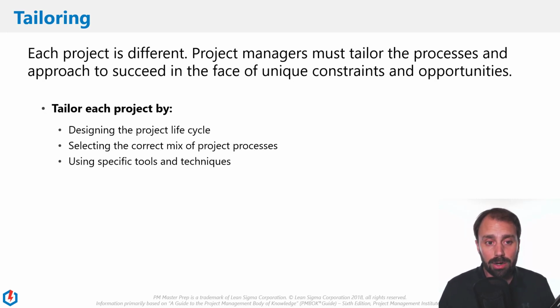So you're going to tailor each project to design the project lifecycle to fit what's needed by the client. And then you're going to select the correct mix of project processes based on logic. And then you're going to use the right tools and techniques to fit the needs of each process, right? And so you're not going to just follow the letter of the law of saying, hey, this input, output, and tools and techniques chart says I must use all these things. That doesn't make any sense. You're going to pick the things that are germane and relevant to that situation and use those tools. We only use things that work. And so that's what we're trying to do. We're trying to tailor the project to the situation that's faced.